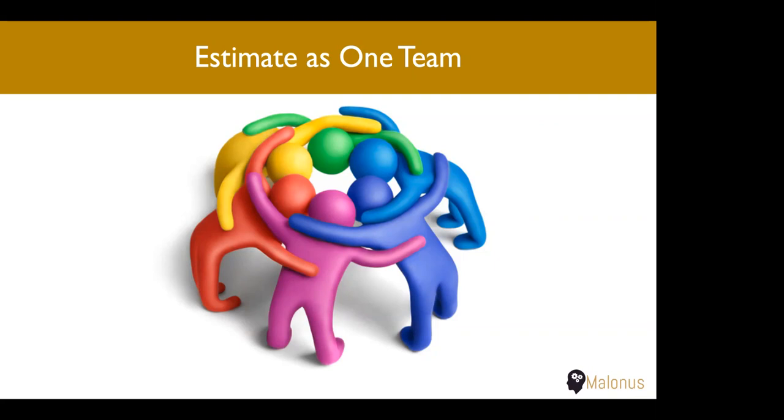The whole idea of this planning poker estimation approach is to have a shared understanding about what needs to be done and how. That shared understanding can happen only when more people are on board who are able to speak about their perspective around that story. For example, somebody says that for this story we just need to make a one-line code change.